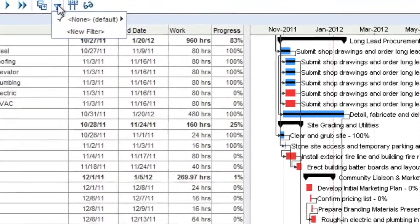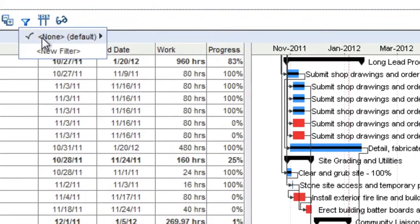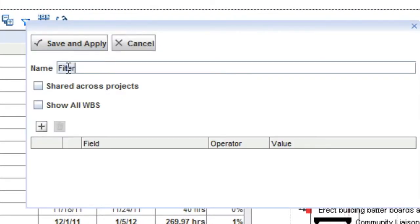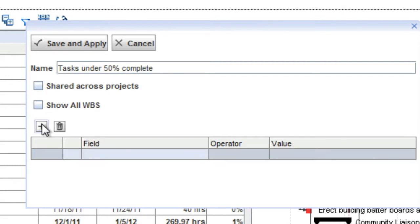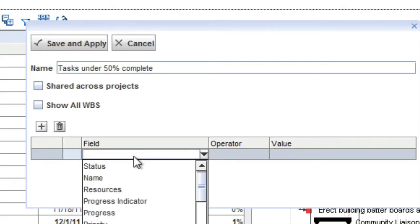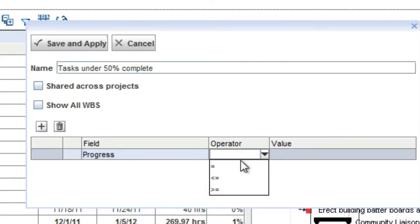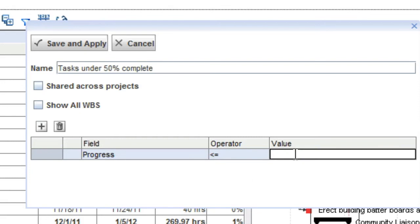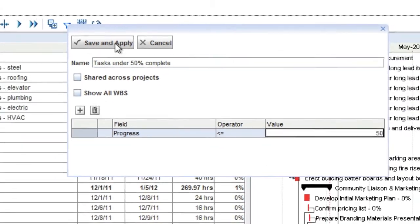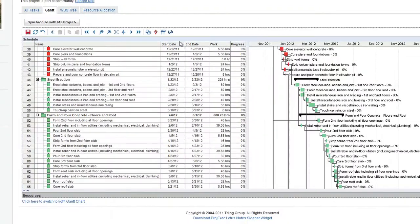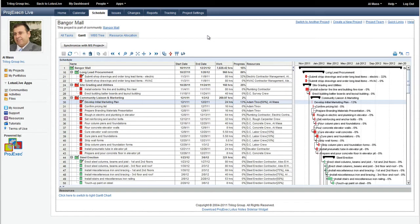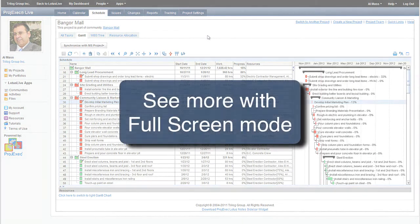Also, you can filter the project task list with custom filters that you create. Perhaps you have a large project and you only wish to view tasks that are less than 50% completed. You can set up a filter for that or for any other set of criteria and view only those tasks that you wish to.